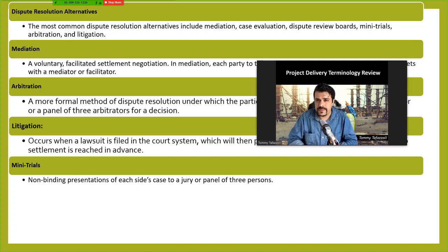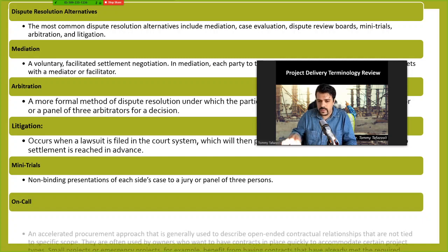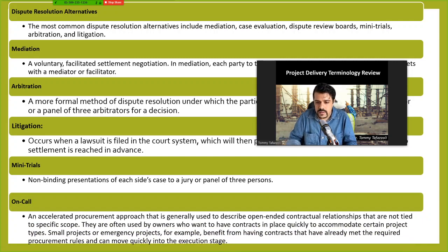Most of the time, it creates a chance that they could figure out some resolution for that. But again, it's not binding. It means you are not legally responsible to follow the decision that is made by that panel, most of the time 3 people.